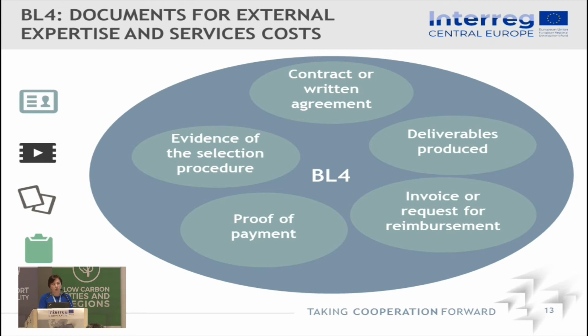For the services, you need to provide an invoice which fulfills all the national requirements, and clearly states the service, the project it is referring to, the co-financing source, and so on. And of course proof of payment, which is again the bank statement or the extract from the partner accounting system.